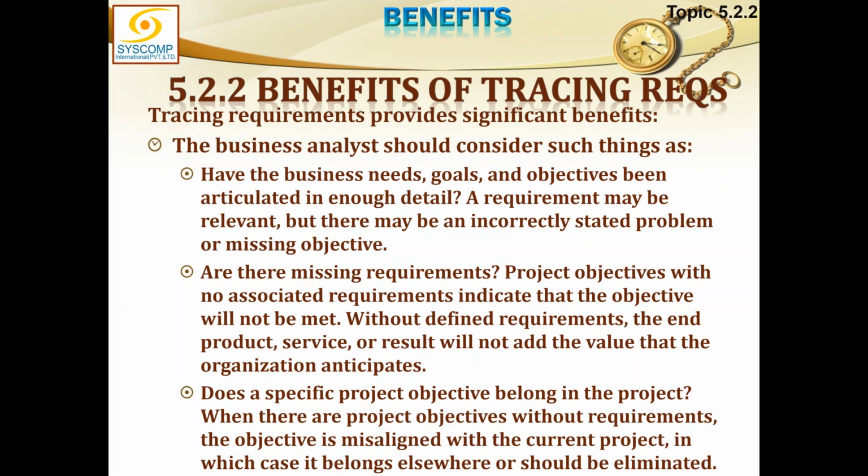Does a specific project objective belong in this project? When there are project objectives without requirements, the objective is misaligned with the current project, in which case it belongs elsewhere or should be eliminated.